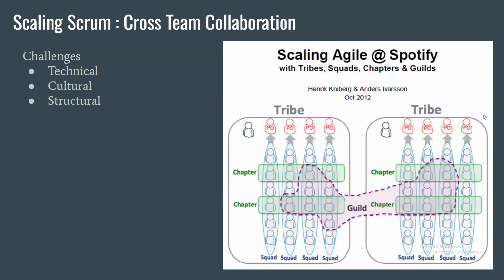So squads are arranged as a tribe, and tribes can scale as you build and get a much bigger team. You can add another tribe. Each tribe has their Scrum master, and they handle maybe between 1 to 4 squads. Squad members might be reporting to somebody else, because they don't report to the product owner. That is basically the reporting structure. That's called a chapter. Don't get hung up on the name.